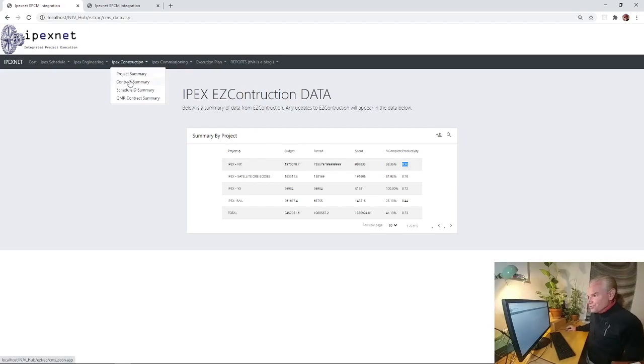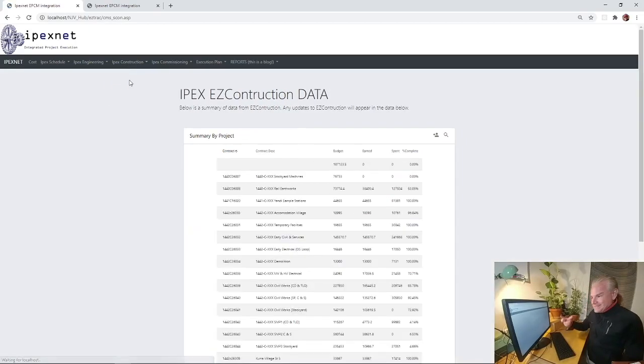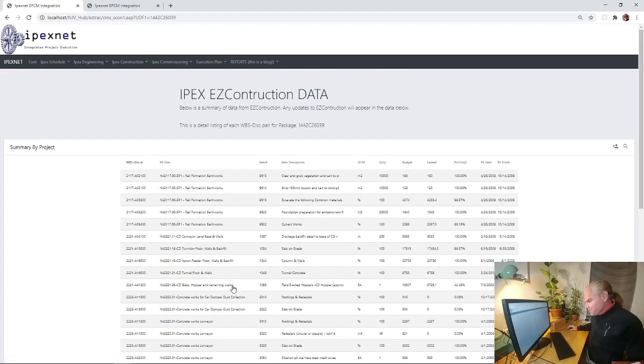All this information with construction is really dialed into contracts because we have contractors delivering scope. In this example, I want to drill into one specific concrete package that I've set up. These might be all your specific line items on your contract, and I've got all these linked into schedule IDs. Here we've got multiple items to the same schedule ID, and some of them are unique to a schedule ID, but you can clearly see that.